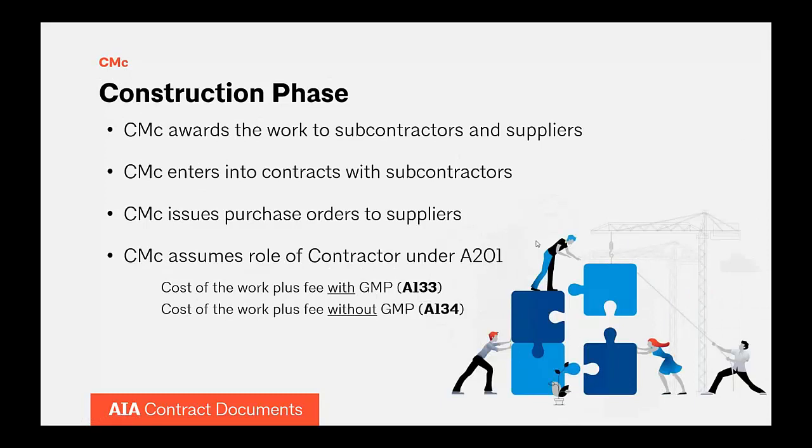As we noted, once the construction phase begins, the construction manager then transitions to a traditional general contractor role. CMC allows, and I really personally recommend, a very rigorous subcontractor screening and selection process where you can select subcontractors based on qualifications, experience, and resource ability, not just a low price. Subcontractors also can be selected early during the design phase to bring specific expertise and design assistance to our projects. Both of these opportunities significantly improve the chances for a successful project. Next slide.